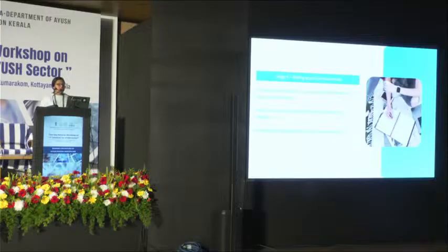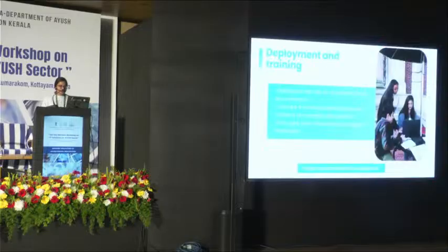Then was stage 4, testing and quality assurance. We conducted internal QA for usability, security and performance, then ran a number of pilot programs with small batches of learners and also incorporated feedback for improvements.